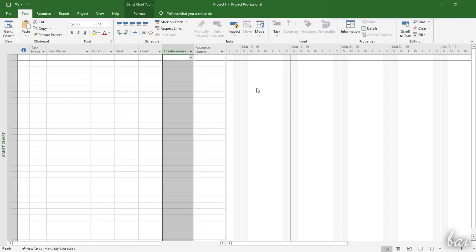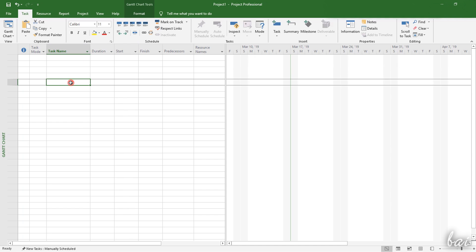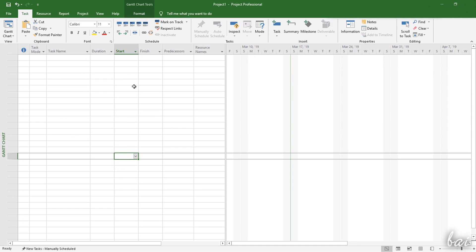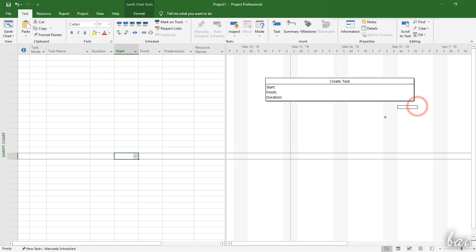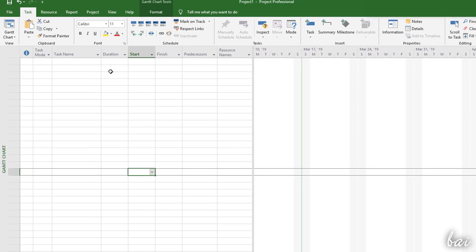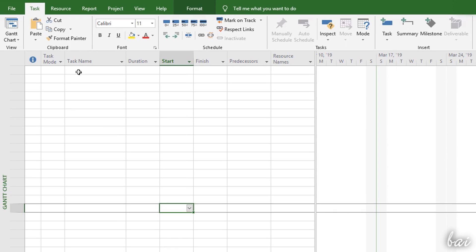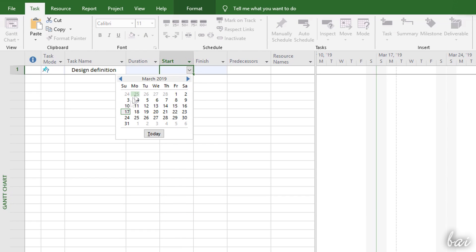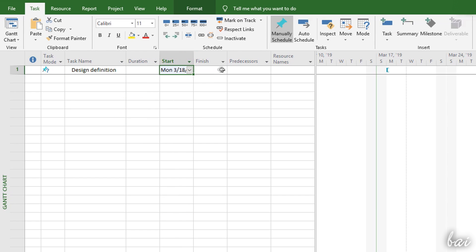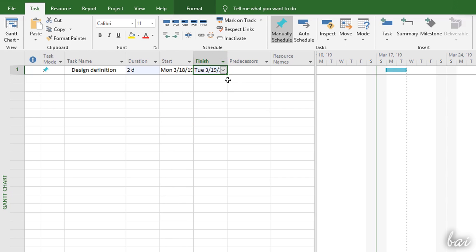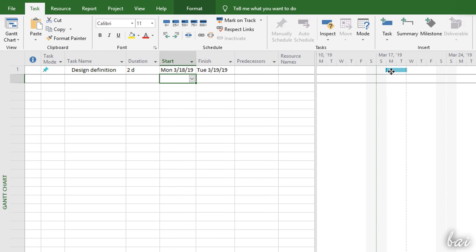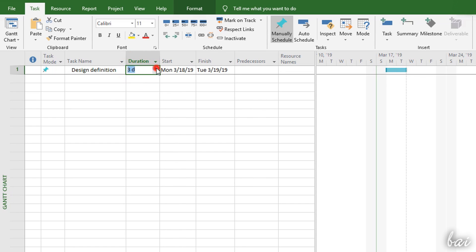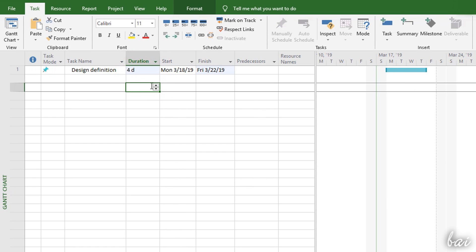First thing to do is to define the complete list of tasks on the task sheet on the left, and then organize and check these through time on the Gantt chart on the right. To create a new task, type the task name on a new row and define when it should start and finish. At this point the task appears on the Gantt chart as a colored bar extended on the timeline as much as the task duration is.